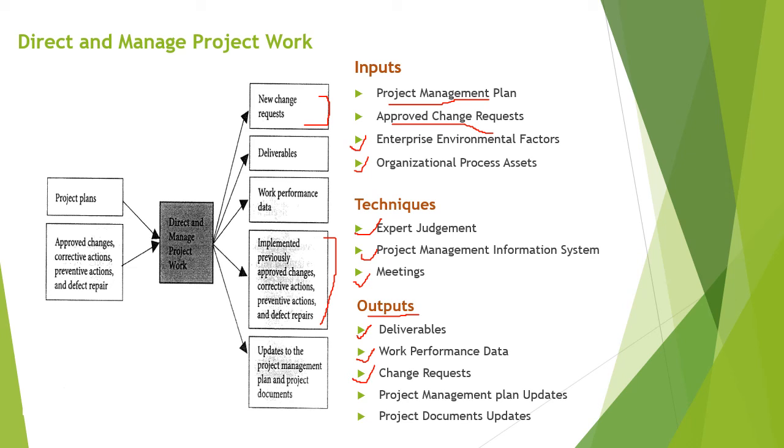And finally, when you execute the project, at the end you need to update all your project management plan and project documents. For example, if any new requirement has been generated, the requirement documentation needs to be updated. You need to update your project logs. If any new risk has been identified, you need to update your risk register. If any new stakeholders have been identified, or the stakeholder engagement has changed, the stakeholder register needs to be updated accordingly.